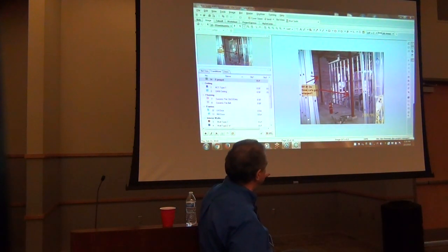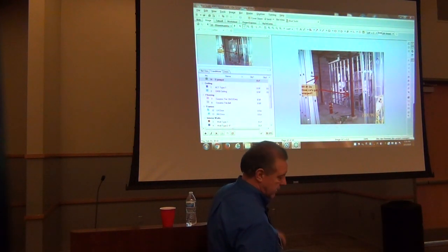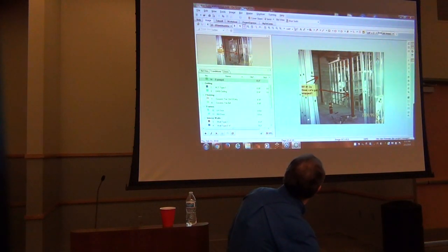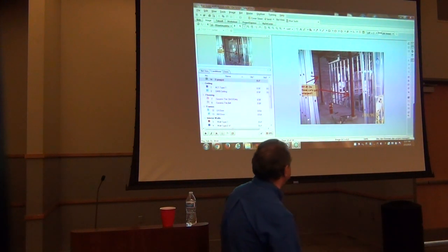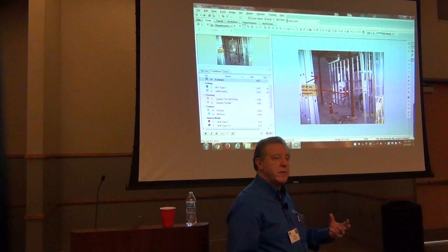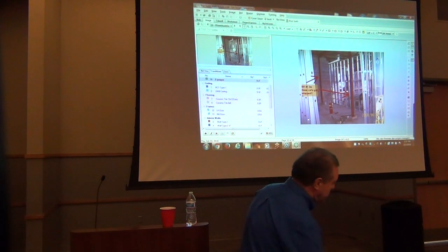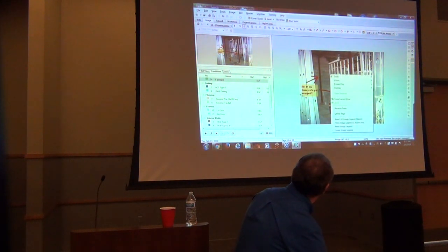This is so much better because it's a photo of the real site conditions. And I took the text tool right up here, this little black letter A, and I wrote a note, RFI number 1. Did these columns get wrapped, with indicating arrows? I can have that in front of the architect in about 30 seconds. It's good for me and it's good for him because there is less confusion about what is the issue here and where is it. All I have to do is right-click, copy current view.